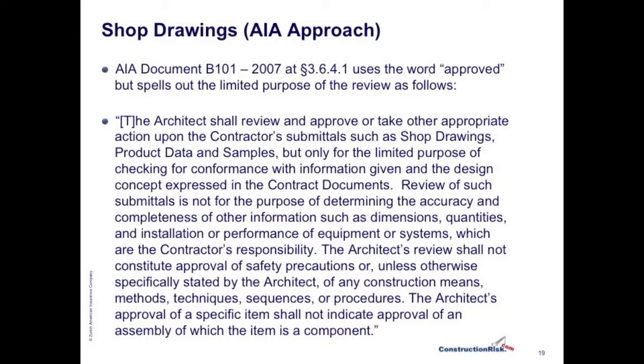Review of such submittals is not for the purpose of determining the accuracy and completeness of other information such as dimensions, quantities, and installation or performance of equipment or systems, which are the contractor's responsibility. The architect's review shall not constitute approval of safety precautions or, unless otherwise specifically stated by the architect, of any construction means, methods, techniques, sequences, or procedures. The architect's approval of a specific item shall not indicate approval of an assembly of which the item is a component." Close quote.